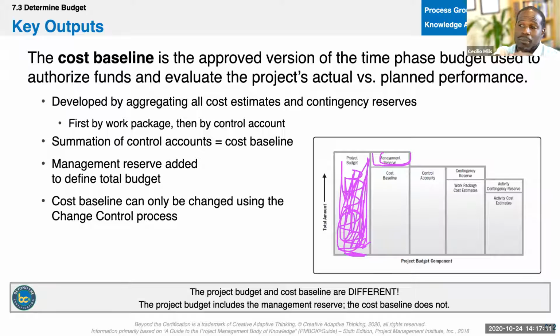So now if that system is not working, or it could be that I'm getting these materials from the East Coast because they're cheaper than to get it from the West Coast. However, if we get some sort of delay, I am now going to have to cancel that order and buy it at a higher price here locally so that we can adhere to our schedule. And that's where the second sort of reserves come in.